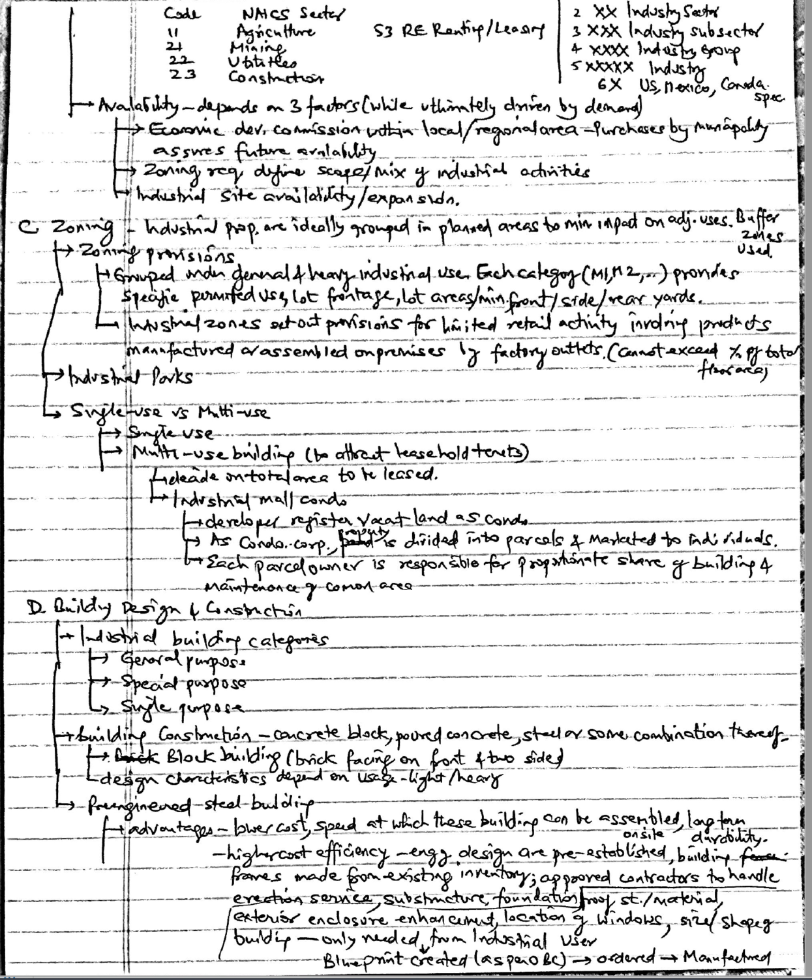Rent quotation is established for the tenant following the cost estimates and pro forma statements. The design strategy has the tenant information and solid financial capabilities. Preliminary proposals evaluate option strategies for tenant and developer, and an initial proposal is prepared for consideration by selected developers. The developer may discuss and evaluate the preliminary proposal from the developer's perspective. The broker works with the developer and, using their expertise, establishes a detailed proposal along with the rent quotation. The detailed proposal and rent quotation are submitted for acceptance. Provide follow-up and assistance as required, leading to the project completion.